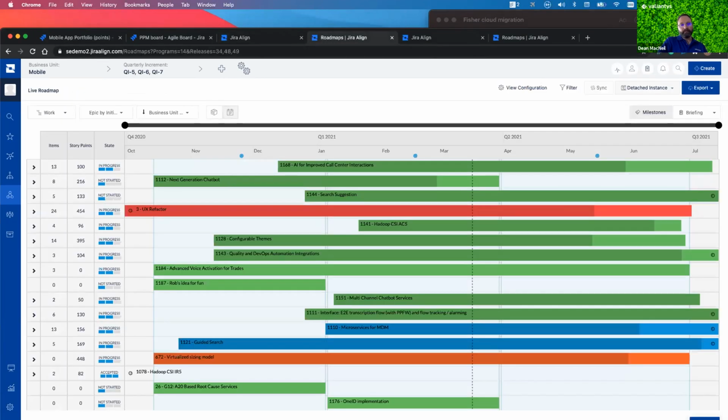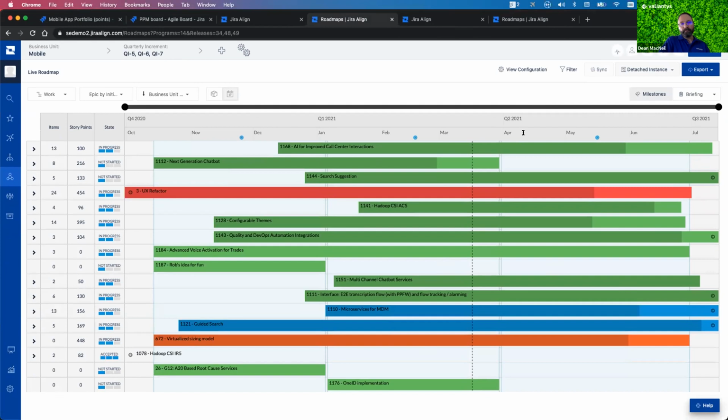Now, in Jira Align, what you can do is tie these items together and have similar features in terms of roadmap that is going to be built for you by the tool based on how you've prioritized your backlog and assigned items to specific program increments. Unlike Jira and Advanced Roadmap, Jira Align has a built-in comprehension for program increments or quarterly increments, the shared cadence that we have across those different teams. This is very helpful because now we have the ability throughout the tool to categorize and understand those items based on those quarterly increments. And that becomes key for planning at that level.